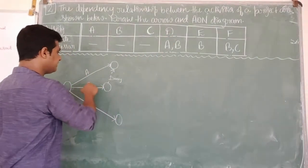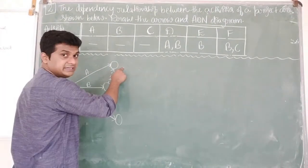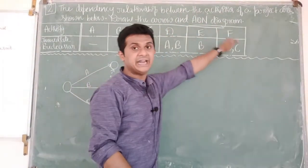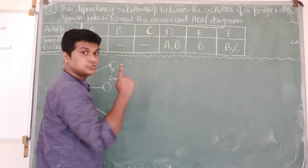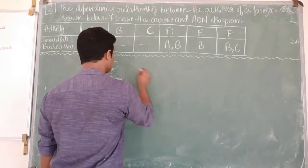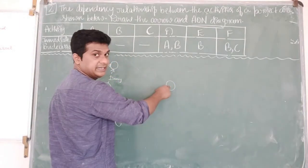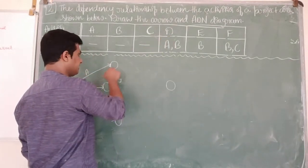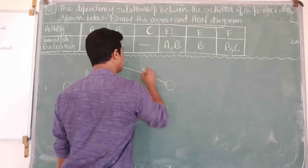Now activities A and B are ending at the same event. From this event, I can start activity D. Since D, E, and F are all ending activities, these three activities should end on the same event. So I'll indicate this as the ending event and draw activity D from the joint node to the ending event.